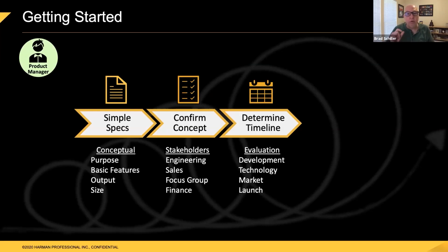It could be that there's a light engine that produces 100,000 lumens of output, but it's not going to be out until next year. And so you've got to wait 6 months, 8 months, a year before you even get the first sample from the vendor who makes those new LEDs. So sometimes you might have to wait on technology, or it might be that you have other products in the development cycle, so you've got to wait 3 years before you can start this.